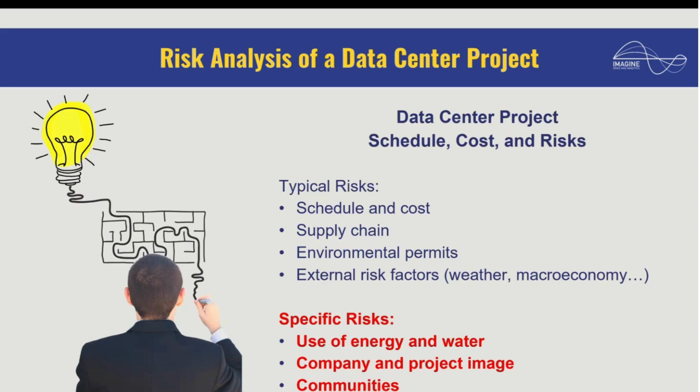That helps on one hand, but is also detrimental from another point of view. Because if you are within the city limits, there are some extra things you have to worry about in terms of pollution, noise, and other things that might be a problem. The environmental permits within the limits of the city might pose some additional risks to the project, okay?